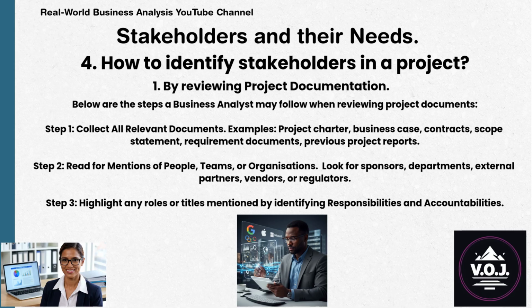1. By reviewing project documentation. Below are the steps a business analyst may follow when reviewing project documents. Step 1. Collect all relevant documents. Examples: project charter, business case, contracts, scope statement, requirement documents, previous project reports. Step 2. Read for mentions of people, teams, or organizations. Look for sponsors, departments, external partners, vendors, or regulators.